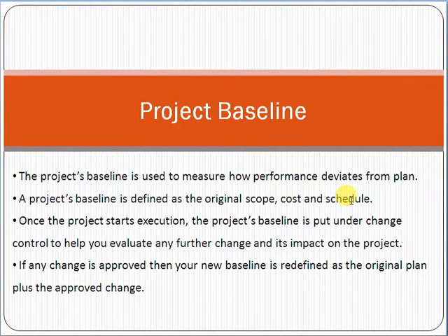For example, if your cost was $5,000 and after a few months you recognize that $4,000 has been spent, that means you are under budget. So that means you are okay. If you have spent $6,000 and your original cost was $5,000, that means you are negatively deviated from the plan. So this is mainly the concept of baseline.